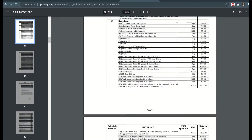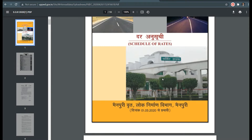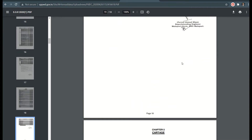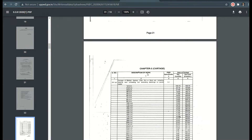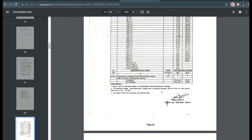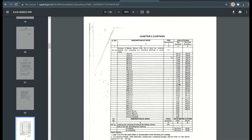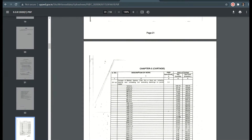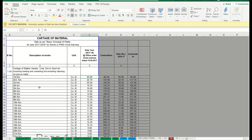I will show how it looks. This is one Schedule of Rates for 2020. See — this is the lead distance related information, Chapter 1, Chapter 3. This is for concrete, coal aggregate — how much we have to consider as a lead. Most companies might have prepared this and you have to update it according to the year. See, this is the old one from around 2017-18, and this is 2020 — the rate has changed, for example 100.70. You have to update this column as per the year.